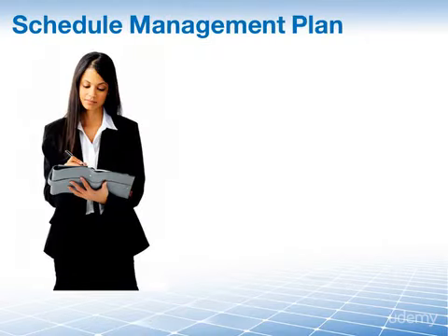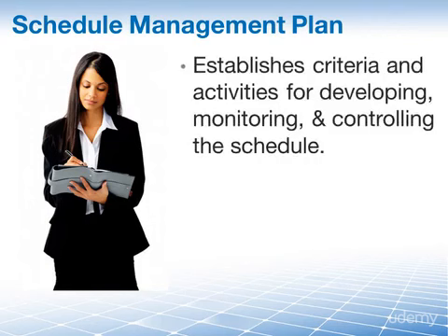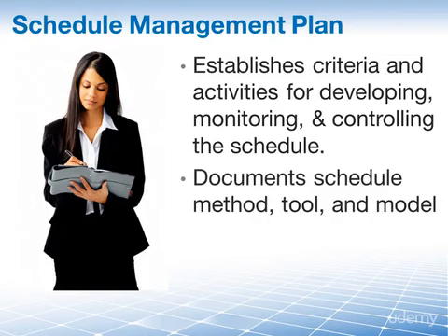But how do I know which scheduling method to use, what scheduling tool we have, what the schedule model is that we're going to have to rely upon? Well, that is defined in the schedule management plan, an important output of time management. It is defined as a component of the project management plan that describes the criteria and the activities for developing, monitoring, and controlling the schedule. In other words, it is a plan to plan your schedule. The schedule management plan is where you choose and document an appropriate schedule method, scheduling tool, and schedule model to finally create your project schedule.